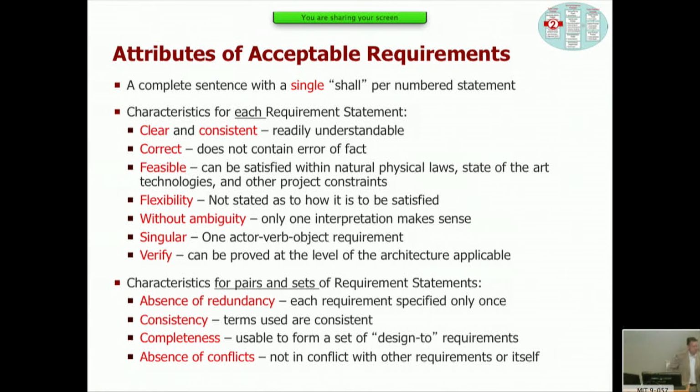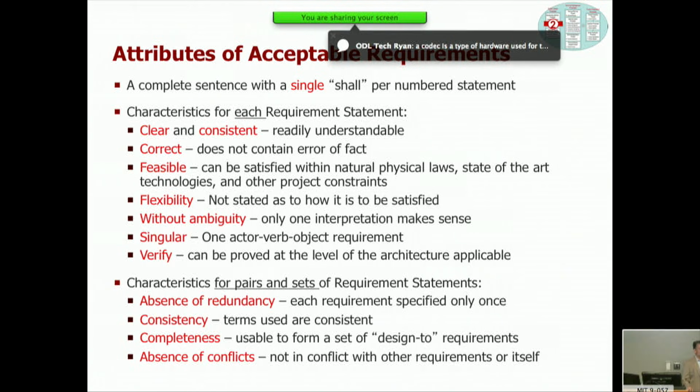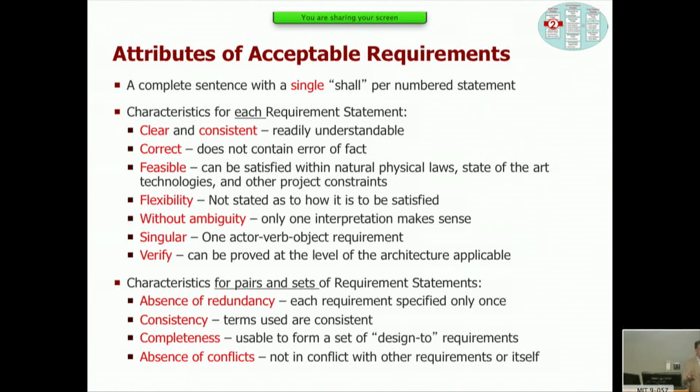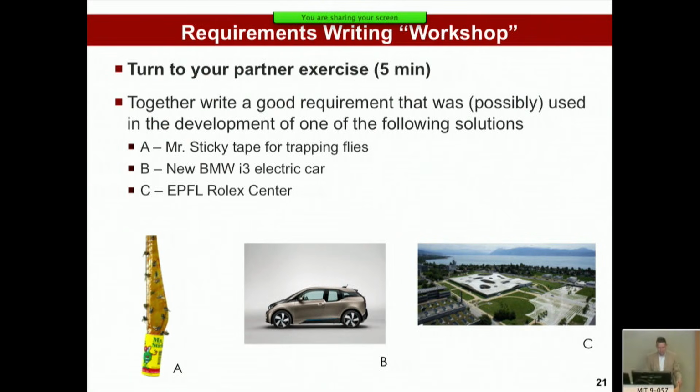This is also similar to feasibility, and it's a tricky one. Requirements can be in tension with each other, particularly if they're should goals, but they shouldn't be in direct conflict with each other. For example, one requirement says you shall use aluminum for this unit, and another says no metals are allowed in this unit. That conflict is not solvable; it's a direct contradiction. That's different from having competing requirements or requirements in tension.